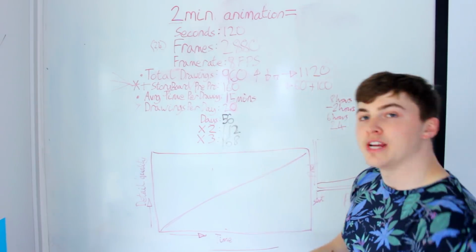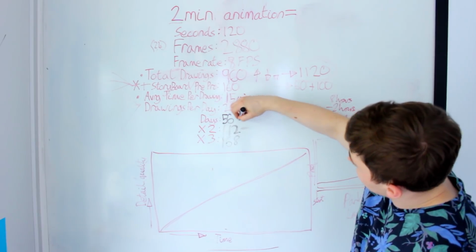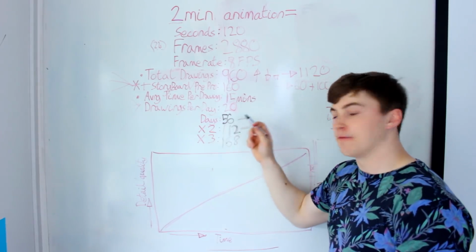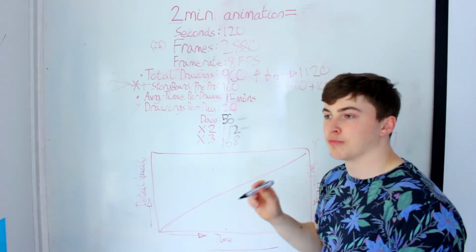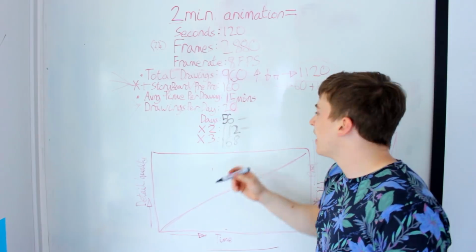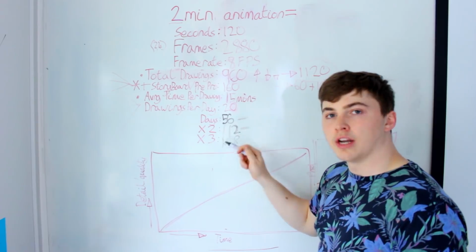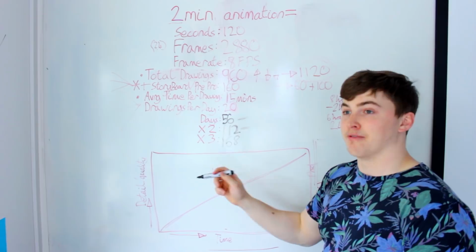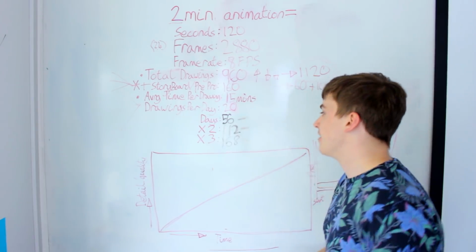So you've got the 3 tiers here. You've got the Risktaker tier, which is the first one, 56 days. That's if you are prepared to no life it, you can do it in 56 days. If you want to be much more safe, much more calculated, and to have a life at the same time, but still to work hard every day, then the multiplication by 2, 112 days is great. If you want to be really safe because you're working with other people's money, you've got to really make sure that when you say you can deliver it, that is the day you can deliver it. Well, then you got 168 there.